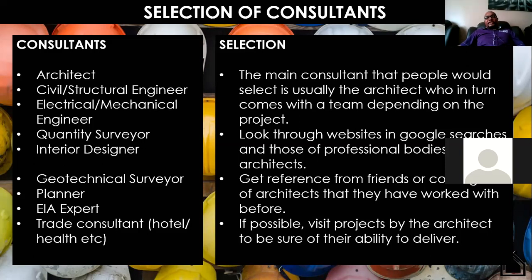So on the same plot, say half an acre, now you're bringing in 20 or 30 families, whereas previously there had just been one family. So the planning authorities would consider all those factors. And the person that you need to make that application would usually be the planner. And then for a number of projects, you need environmental impact assessment. These are projects that are massive in nature, that are going to have some impact on the environment. So you need to satisfy the agencies that what you're doing is not going to have any negative impacts. And if there are going to be any, then how are you planning to mitigate those negative impacts? So for that, you'd also consult an environmental impact assessment expert.